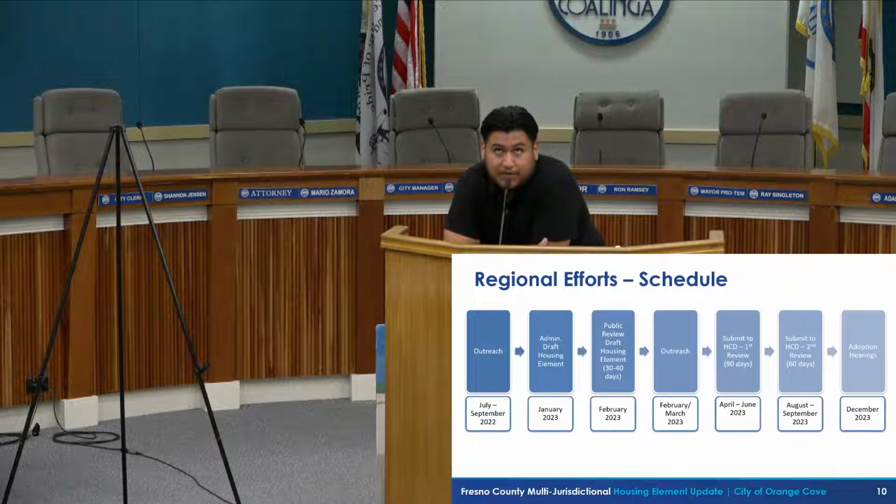After that second round of outreach is completed, we then submit our first review to HCD for the housing element, and that is expected to occur between April and June of 2023. Then after that review is completed, it gets resubmitted to HCD for a second review, and that typically is a shorter process of only 60 days, and that usually is completed towards the end of September of 2023.